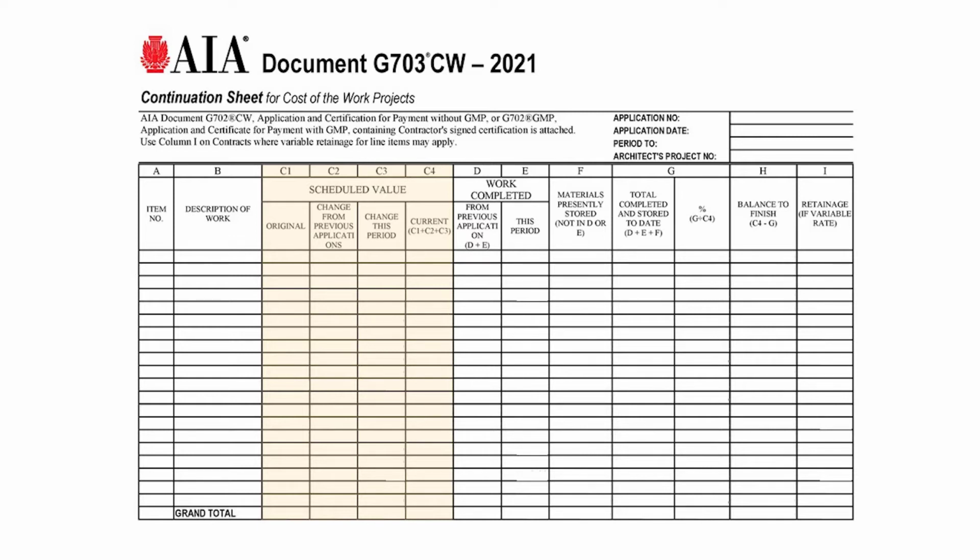It might go to another line item. It might go to the small c contingency item that Robin spoke about. But this way you could look at each line item from pay app to pay app and understand where, if any, money was taken from or added to, and the rest of the columns worked as in the original G703. So that was the idea behind our discussion and our logic when we created this: the ability to understand from month to month where money, if any, shifted from one line item to another. And that all seems very straightforward.